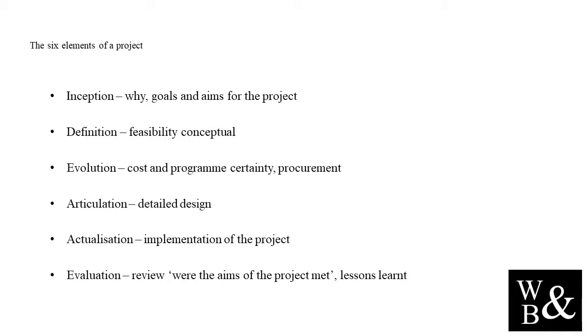For example, if we're looking at a new road, is the road needed to ease congestion or make the road safer for users? We also need to look at the business case. Is there a case that the project may bring efficiencies to the business operation? Will the project improve the business's environmental impact? Therefore, in this element, we may look at existing data to understand the need for the project. Is there data that suggests the project may reduce journey time and the environmental impact? And can this be quantified?